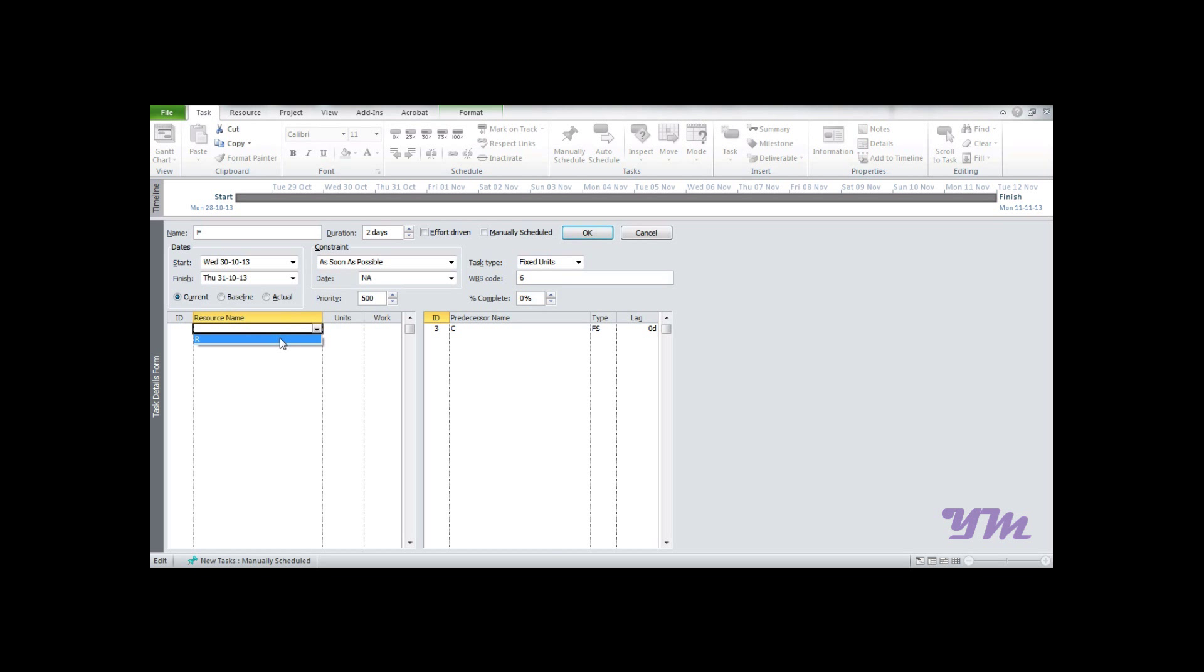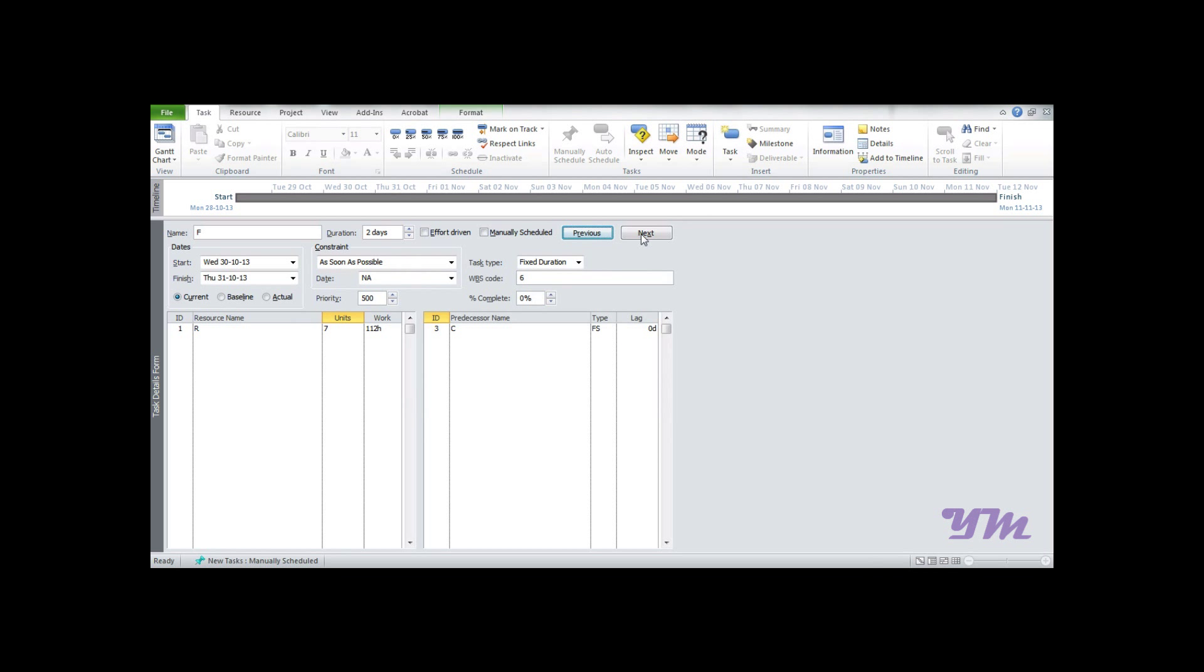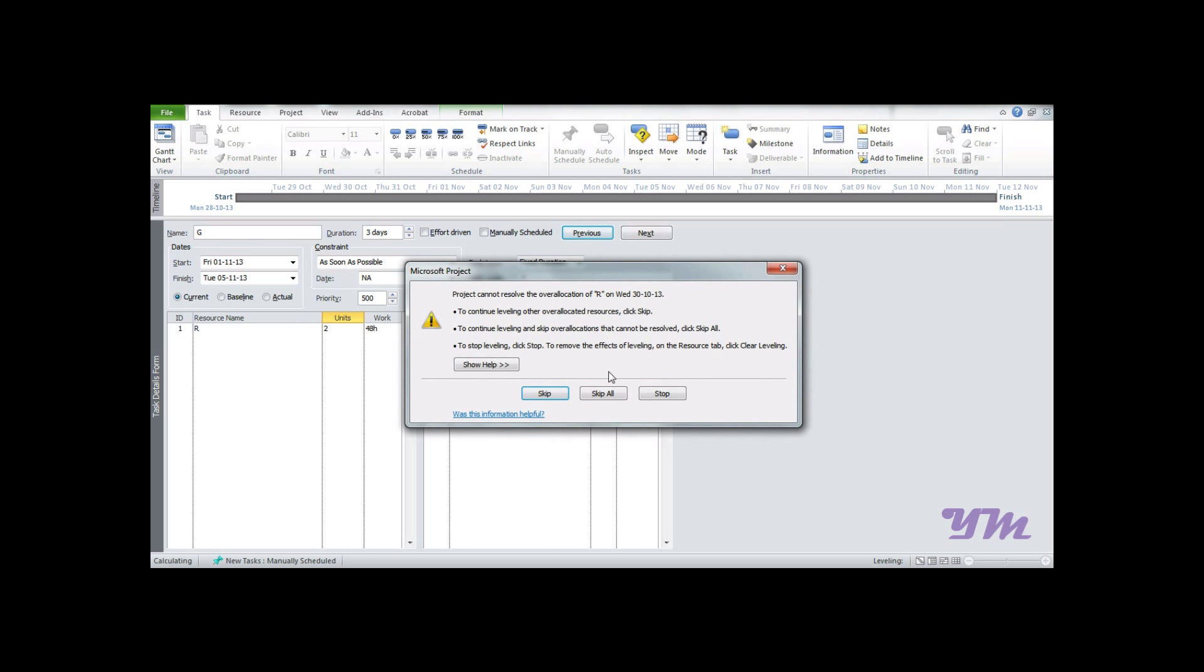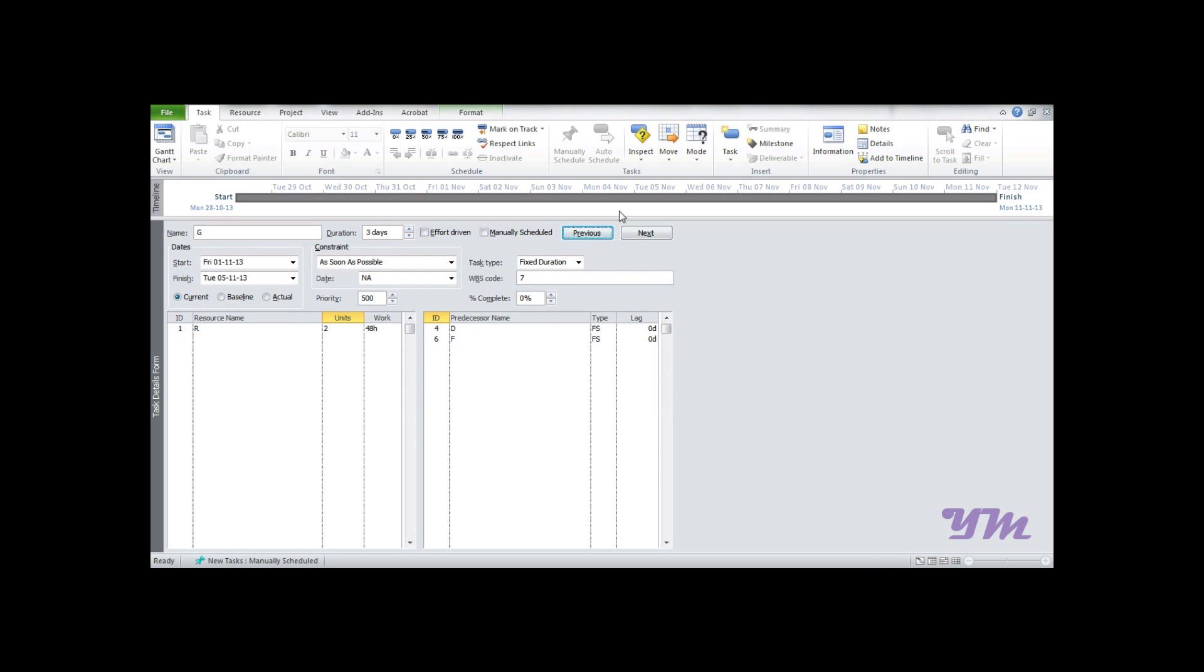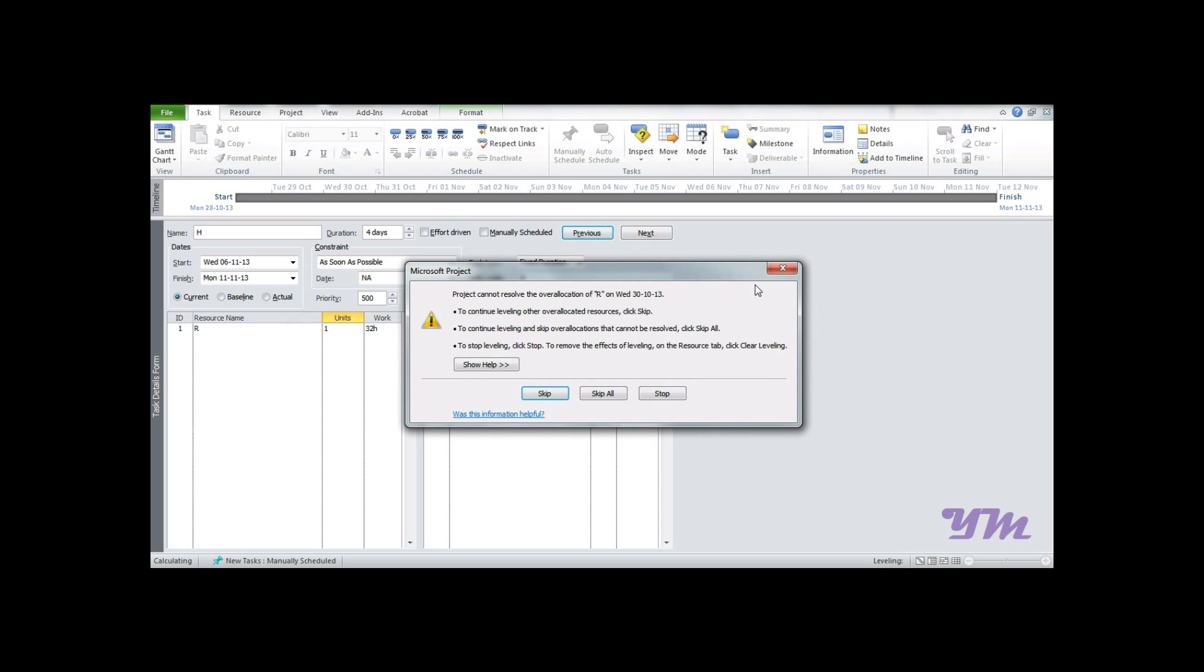For F, resource R, unit 7, Fixed Duration, OK. If over-allocation error occurs, just press Skip or Cancel. For G, assign resource R with 2 units, change to Fixed Duration and press OK. For the last activity H, we have 1 unit, Fixed Duration, OK, Cancel it.